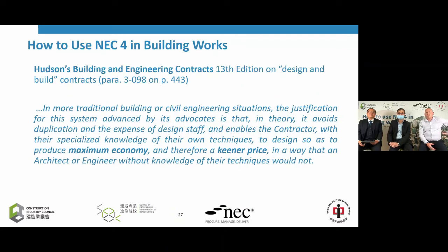Now, I also managed to find this passage from the very authoritative construction law book, Hudson's Building and Engineering Contracts. The learned author of this book states in paragraph 3-098 that in more traditional building or civil engineering situations, the justification for this system, meaning the design and build system, advanced by its advocacy is that, in theory, it avoids duplication and the expense of design staff and enables the contractor, with their specialized knowledge of their own techniques, to design so as to produce maximum economy and therefore a keener price, in a way that an architect or engineer without knowledge of their techniques would not.